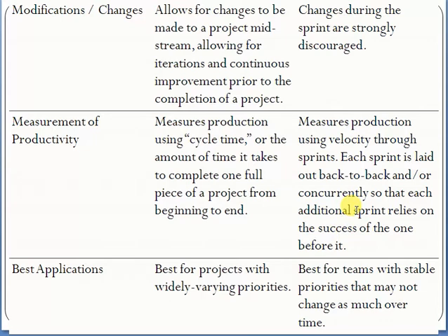What does it mean, friends? Basically, in Scrum there's a concept of velocity, that is, how many tasks are completed on average in a sprint, a 3 to 4 week time period. Velocity means how much work has been completed in a 3 to 4 week time period. So by using the velocity and sprint, we can measure the performance of our work.